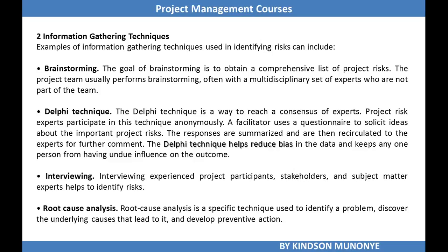Why do we need the Delphi technique? Why do we not just conduct meetings? This is because the Delphi technique is unique, it's peculiar to itself, because it's not just like meetings. Sometimes there are participants who might want to remain unrevealed, unknown to others. So a facilitator in the Delphi technique uses a questionnaire to solicit ideas about the important project risks. The responses are summarized and are then recirculated to experts for further comment. The Delphi technique reduces bias in the data and keeps anyone from having undue influence on the outcome.